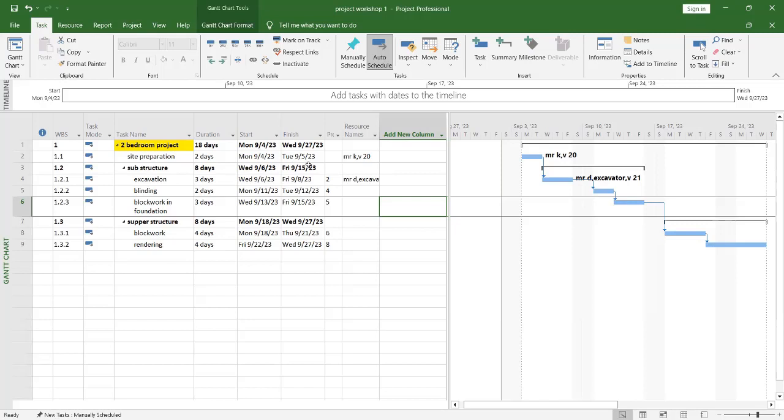And then it happens that on Monday, they actually do not start any preparation for the site, or on Tuesday, they did not finish site preparation, then you know that you are behind schedule. Okay, that is why you need to consider the critical path of the project, so that you do not delay anything that has to do with the critical path for any project that falls in that aspect.